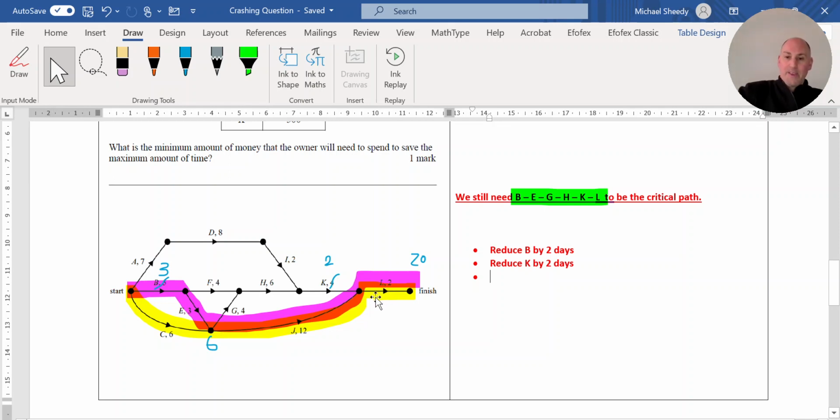So my longest way forward is 21, and it's not the 20. So that technically would mean my original critical path is actually not the critical path anymore, nor is this yellow one or the purple one. Those 3 are set at 20, but this path exists along the top, which actually equals 21.